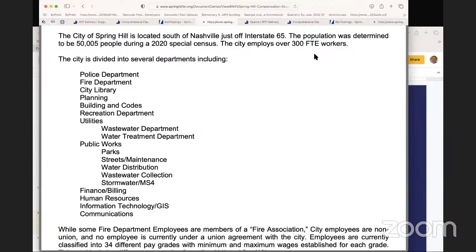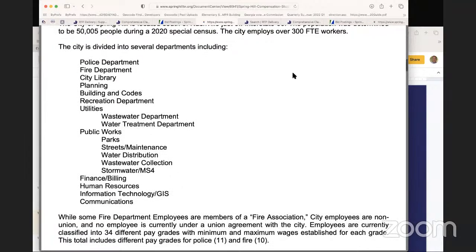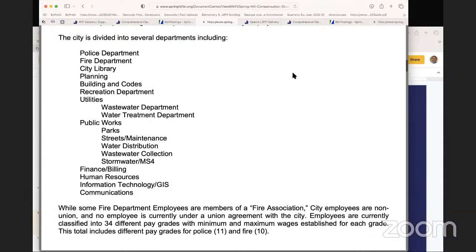That's like a widget number for me. Right away, I know this is going to be about $75,000 for this project. I know that because in the past I've looked at these types of projects, at that primary indicator, the population, and the price they end up at. And in my head I know it's about $225 for each FTE, and so that builds it up. So it adds up, and that helps you in terms of pricing.